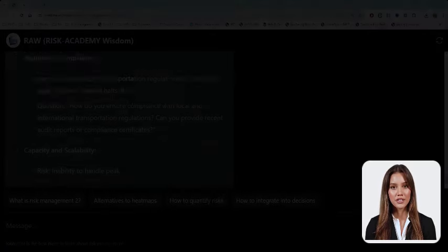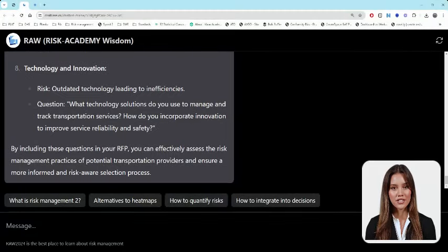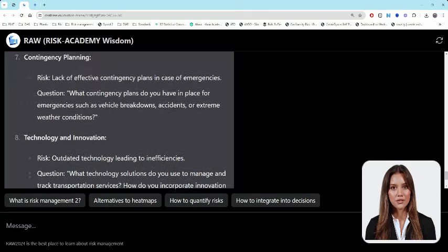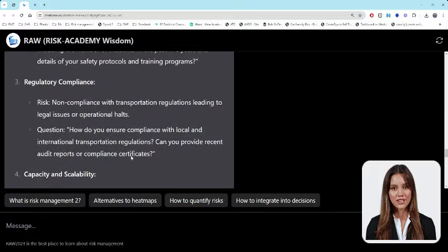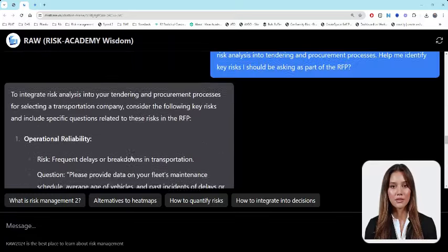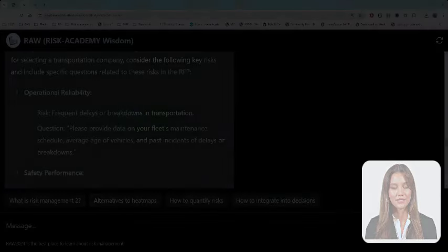So you would typically integrate it into the procurement process, and you would create a checklist or a list of risks that would go into the RFP, into the request for proposal documents, so that each of the potential vendors has an opportunity to respond to it and to provide you with additional supporting information on how they're planning to address these risks. And then whatever risks cannot be eliminated, how these risks will be reflected in the draft contract and the performance criteria, or SLA, with that vendor.